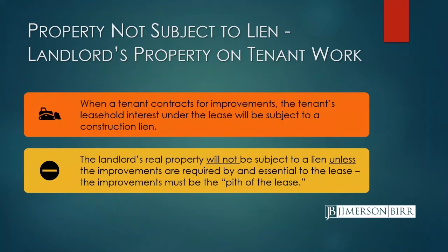That means the lien would apply to the tenant's rights under its lease with the landlord. In a typical case, if the tenant is the one that signs the contract, the landlord's real property, the one that actually owns the real property, will not be subject to a construction lien unless the improvements are required by and essential to the lease. And the case law on this uses a term referred to as the pith of the lease. I have no idea what pith means, but the cases talk about it. The standard is essentially that the lease must require that the improvements be made as an essential purpose of the lease, and not just a case where the tenant is permitted to make improvements.